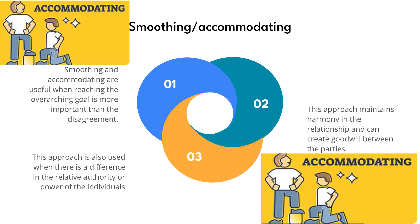Example 2: Resource allocation. Imagine two project managers within an organization vying for the same highly skilled team member whose expertise is crucial for both projects. In a smoothing, accommodating approach, the project managers collaborate to find a compromise — sharing the resource's time between the two projects, even if it means a slightly adjusted timeline for each. By prioritizing the organization's overall objectives and maintaining a cooperative approach, they avoid conflicts, maintain positive relationships, and ensure both projects move forward effectively. This approach focuses on achieving a harmonious resolution, even if it means making concessions.